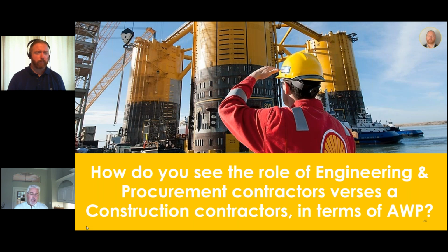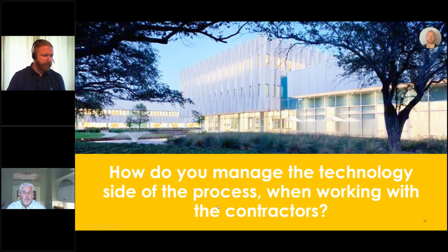So, if Shell and the EPC or the EP contractor, if it's an EP plus C, which is a separate construction from engineering procurement, if we do our jobs properly, then the advanced elements should help the construction contractor get consistent, executable, unconstrained work packages that are supported by all the necessary technical data that they need. Yeah, and I think it's an important distinction. Some people don't realize that the advanced part of advanced work packaging is exactly that, pulling it forward to the earlier stages of a project.